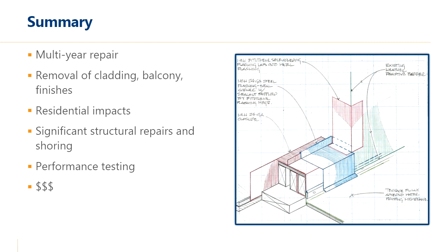Again, this project was multi-year. I'm sure you can imagine it involved removing many more cladding elements and building elements than one might have thought, including stripping entire balconies of their finishes, terraces of their finishes, affecting units below that we didn't necessarily anticipate being impacted, and significant cost of repairs. So to harken back to case study 1, where the work to expose the flashings was 10 to 15 times the flashings itself, this is substantially more than that just to repair these flashing elements.